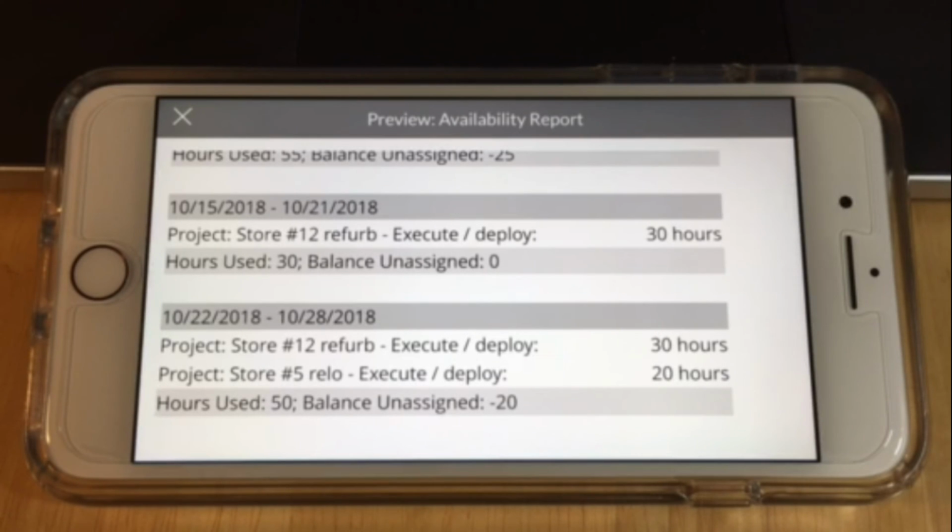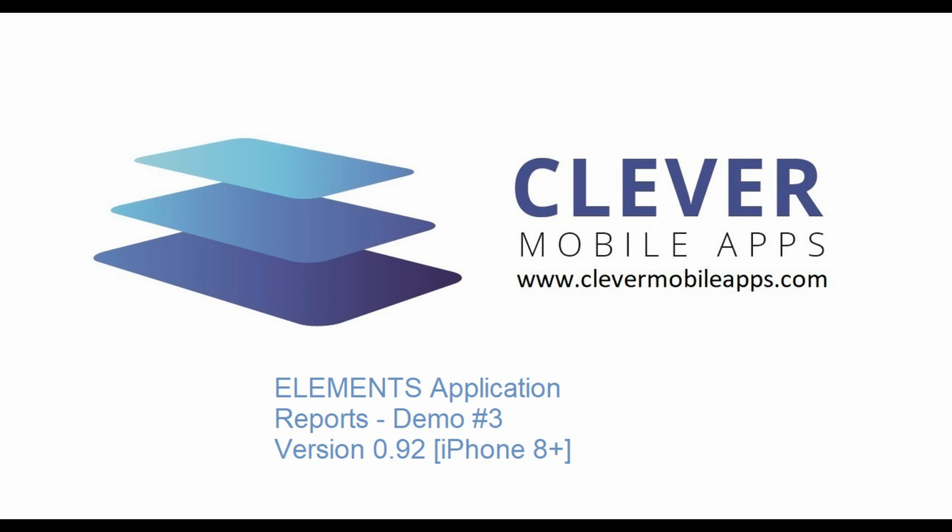It's time to see if he can work some overtime or see if another resource can take on one of his projects. Hint: you can tell if a person has availability when going to add a new assignment, like we saw in the last video, in order to ensure that they don't get overbooked in the first place. After you enter the week and the resource, the app will note how many hours available that person has, and if you do overbook someone, those hours will show up in red. Feel free to rewatch the project cost demo and look to see what I mean.